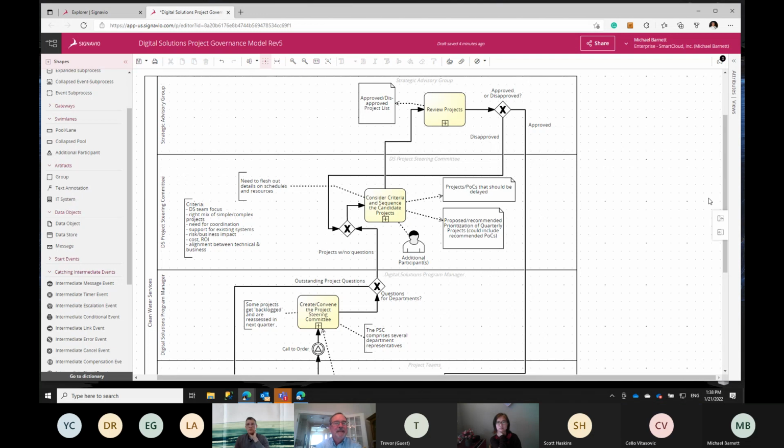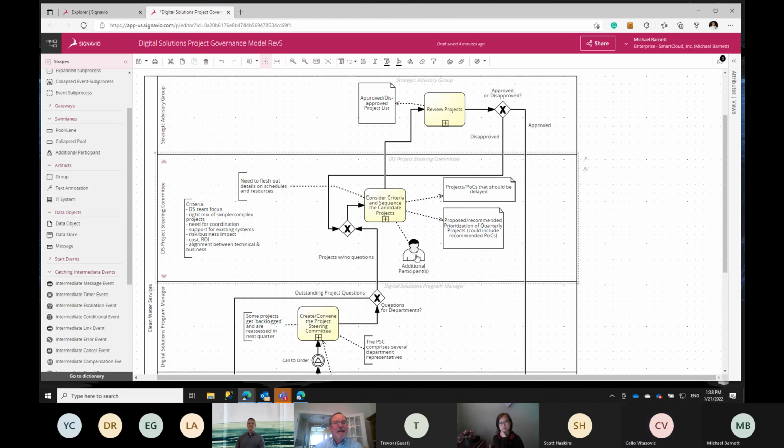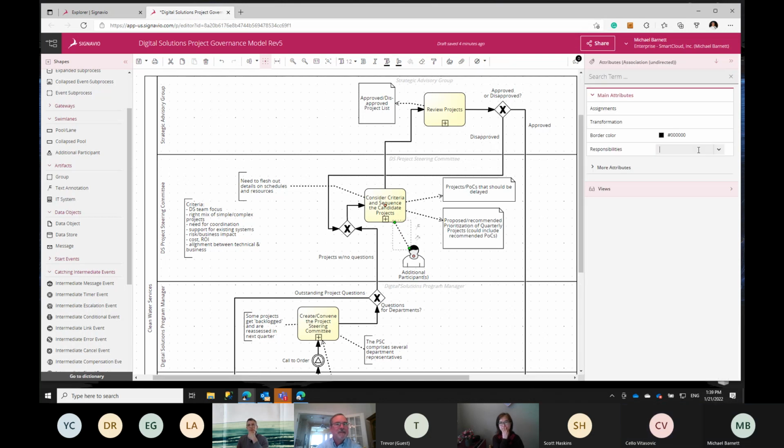And sometimes I think that's under-emphasized, and that has to be made clear up front, especially in the interest of IT resources: if you're going to do this project, we're going to need somebody or somebody's X amount of time over the next 6 months, whatever it is. And here's the task that we need you guys in this operating unit to commit to.